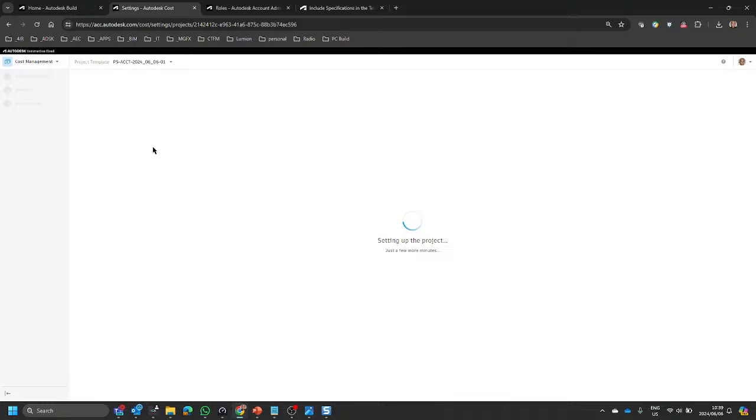So what I would suggest you do is start off with a project that's representative of what you want to do, then create a template, and then get you guys involved, build up on that template, and use that template to evolve the project going forward. That way you don't have to set up the project from scratch the next time that you generate it from an existing project. So do your best with an existing project, set it up as best as you can, then start a template, and keep the template live going from there onwards, and just keep on evolving the template.